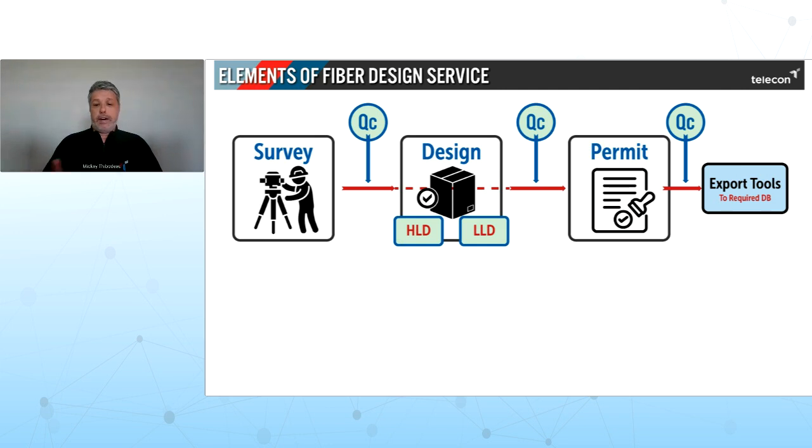Notice here, I've got QC inserted in between each phase. It's an important part of the process. This will ensure minimal reworks from errors, and you'll stay on track with your delivery forecast. Remember, reworks are unbillable hours that can cause margin drop. So keep these concerns under control by investing in a good quality QC program.